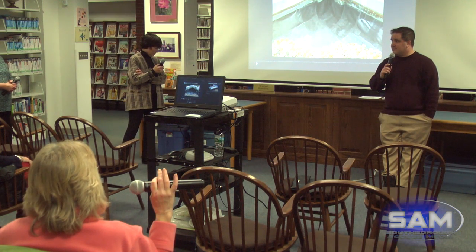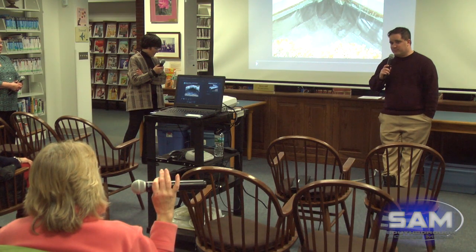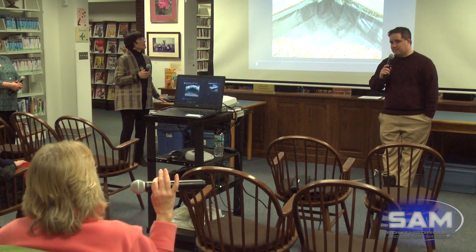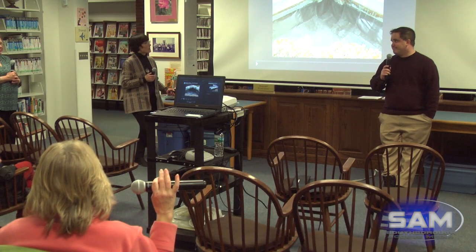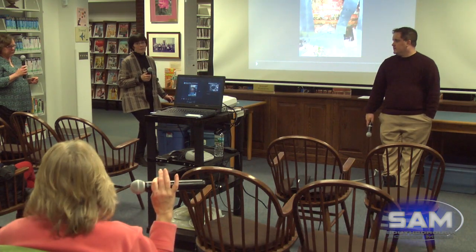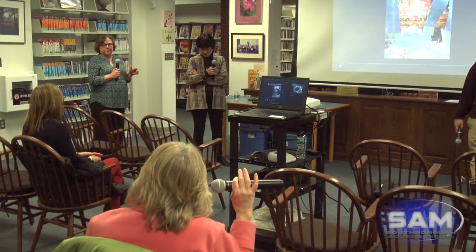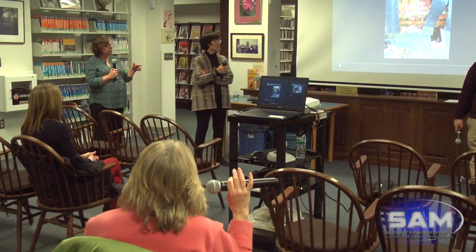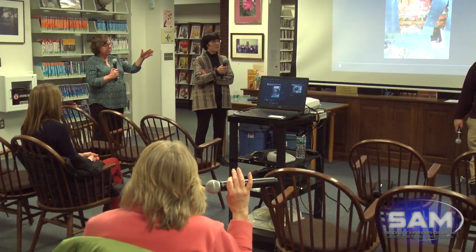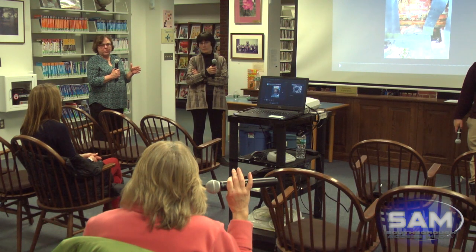When we did the assessment report, really what Lynn and Mary found was that the roof was in much worse shape than we had anticipated. And I think we were expecting it to be fairly bad. Yeah, we did our homework on this. By bringing in a licensed hazardous professional to test the materials, and having a roof company actually open up the roof, we had a better understanding of what really was needed.